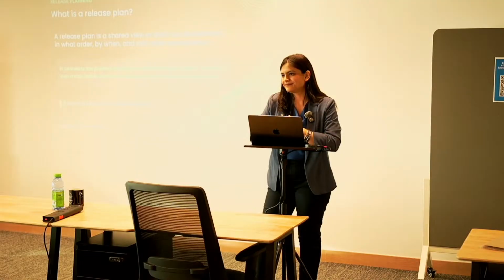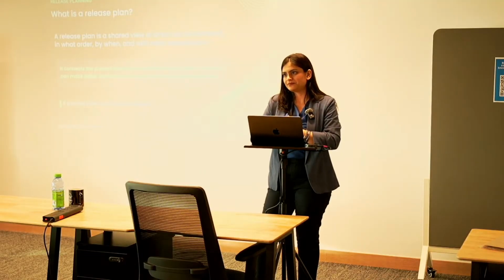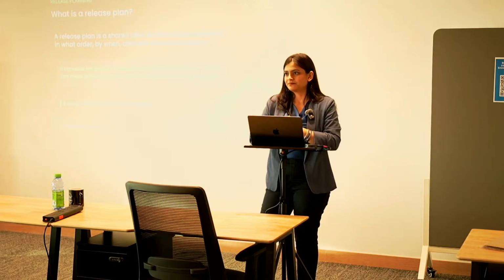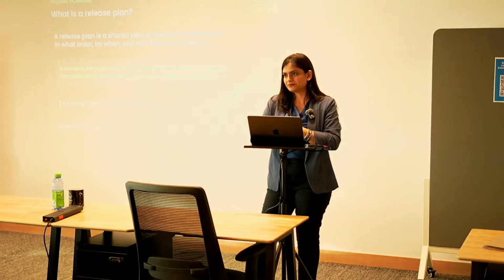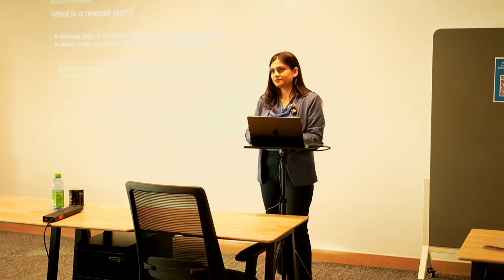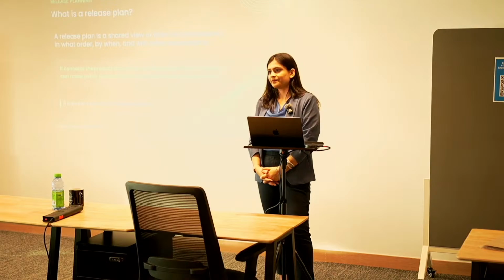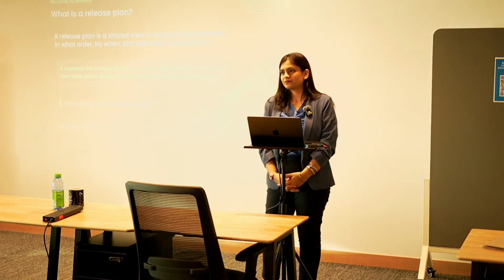It could be a feature delivery or product delivery, whatever it is, and it should be finely distributed in blocks, and those blocks are released. You can have a bi-weekly or whatever the release plan cycles are. And if those blocks are delivered, it could be a successful release plan overall. And if there is a delay, you can have assumptions about how much your release is going to be delayed in every one of those release cycles.